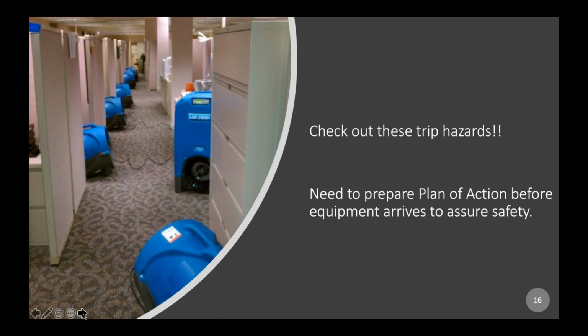But you definitely don't want to have trip hazards, and particularly working in a high traffic office building or nursing homes or anything like that. You have to keep that in mind. That plan of action obviously needs decided a good bit before the equipment arrives, so you're not coming back on day two solving that problem. You're solving that problem as you place your equipment, and that way it never becomes a hazard on it.